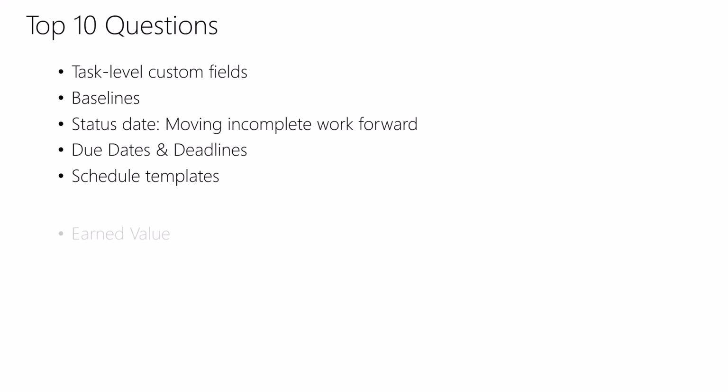We also have many clients that use the earned value feature in Project Online. What about that? I can answer that one, Kenneth. Yeah, if this is a critical feature, then you'll need to go with option 2, which is Project Server Subscription Edition. Okay, short and sweet. I like it. What about resource leveling? Yeah, that will be the same answer there, Kenneth. That's only available within Project Server.